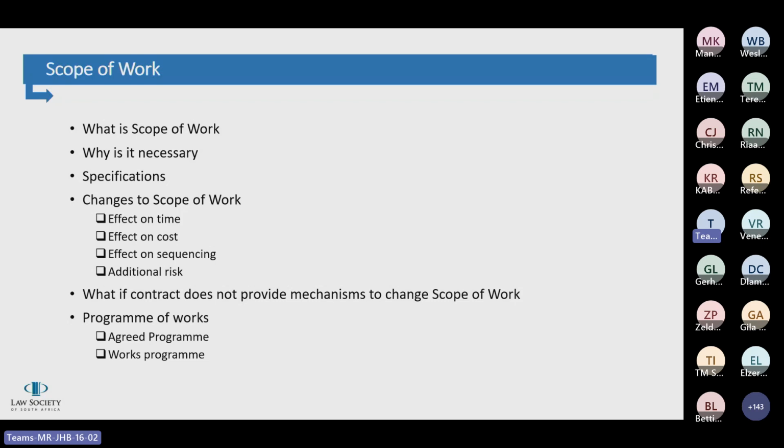A good scope of work will include a project overview, which is a summary and a description of the project, and also a highlight of what the main objectives are. It'll give a project scope, which sets out the goals of the project. It includes quantifiable data, a budget, as well as technical specifications of the work that needs to be done. It's also the document in which to list all the different milestones of the project. It'll include project deliverables, as we said, being the objectives and the targets for the project.